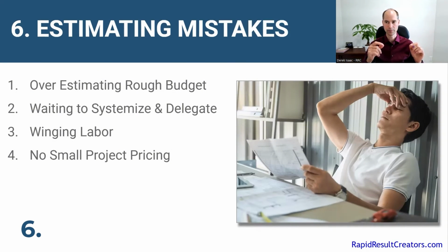And you also want to be more competitive on the larger typical projects than you do on the smaller projects, just to help you stay clear of being that small project builder, taking on too many small projects, being busy with that and not being able to have room for larger projects that come along. So definitely adjust your markup pricing based off the size of the project. If it's a really big project that you really want to get, maybe you can thin your margins a little bit, but don't go overboard.